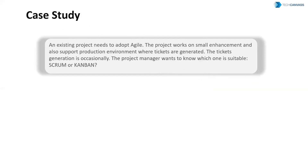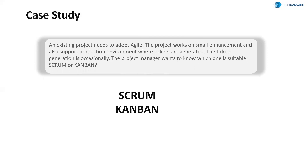Consider a scenario: an existing project needs to adopt Agile. It works on small enhancements and also supports a production environment where tickets are generated occasionally. The project manager wants to know which framework is suitable — Scrum or Kanban. If the project can plan for deliveries at regular intervals of two to three weeks and commit to that, the team can go with Scrum, where deliverables are delivered at the end of every Sprint. This gives the team breathing space, and the predictability of team capacity is high. But if the project demands frequent releases every week or has to support ad hoc requests, Kanban is the better choice — provided the team is self-organized.